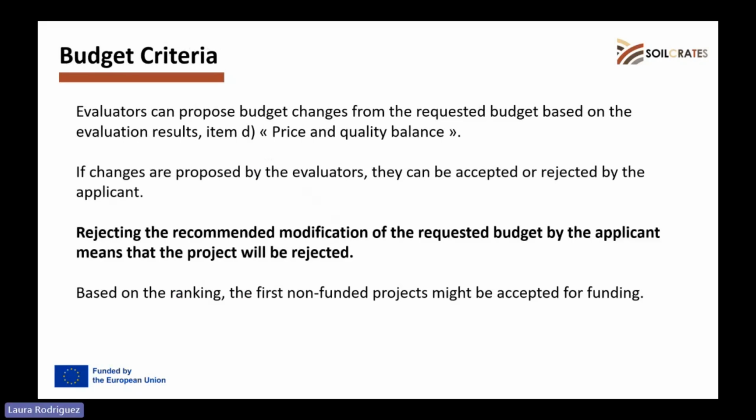On this last one, evaluators can propose budget changes from the requested budget based on the evaluation results. If changes are proposed by the evaluators, they can either be accepted or rejected by the applicant. However, rejecting the recommended modification of the requested budget by the applicant means the project will be rejected. Then, based on the ranking, the first non-funded projects might be accepted for funding.